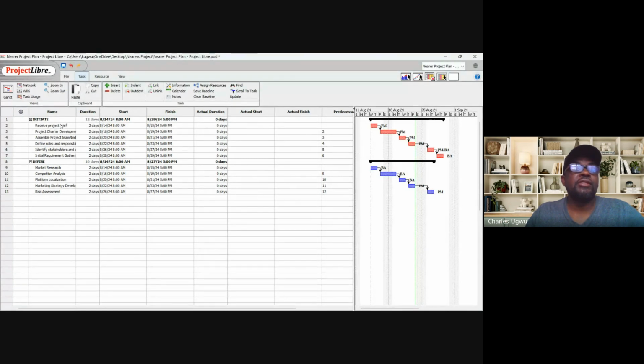When you start work, you are going to be updating what is going on. Like receive project brief is expected to happen within 2 days. If it happens in more than that, you have to update it. This is meant to start on this day, which is 14th of August. You can see we have not started it. Today is 23rd.